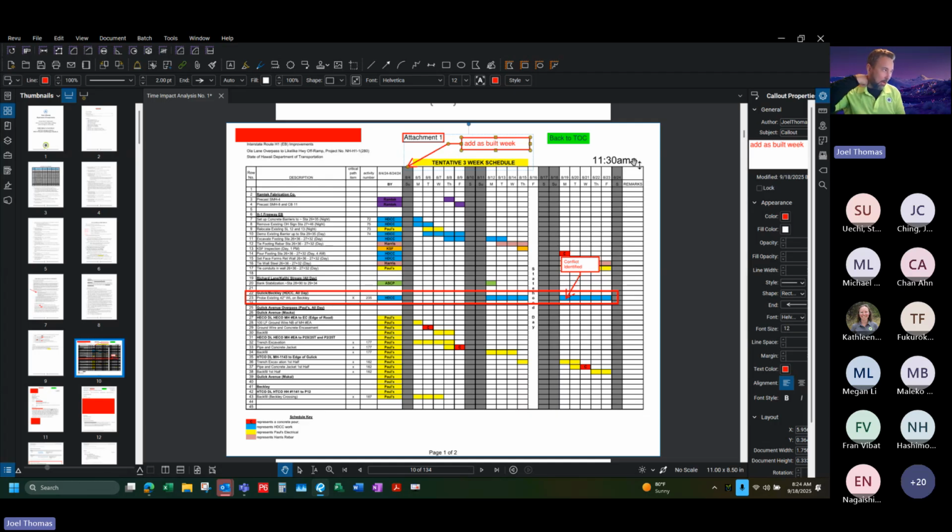I did appreciate it on some level, because I'd rather that you are being upfront with me now. What I've seen a lot of times is contractors will just constrain all their dates and hand you something, and they're almost hoping that there's delay that kind of gets them out of the bind. But in my mind, at least they were being upfront enough, saying, it's just not realistic. We can't make it work.